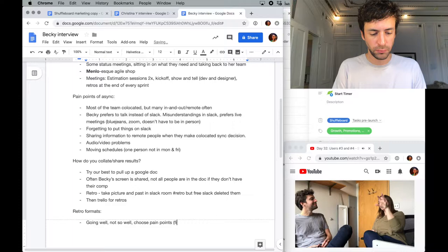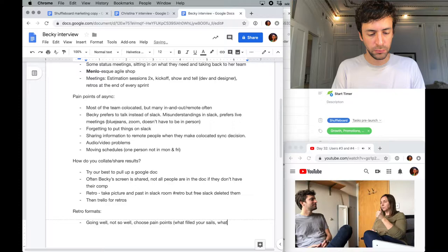So for a while, what we do is have, in the Trello board, there'd be two pictures, a picture of the boat, and, you know, so in essence, what went well, what didn't, and then another picture of the action plan. But the big problem with that was nobody was going back to look at these action plans, and then guess what? Next retrospective would come up.